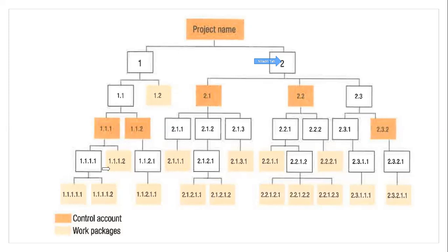So there, the dictionary is very handy. Maybe you are looking into some kind of a dependency on somebody else's vertical, and you find out some word like compliance to meet the FAR regulations, and you're not sure what is that, so you go to WBS dictionary and you find out what exactly a FAR regulation means. Okay, and then you find out, from here it's a written document about anything which is beyond the normal verbiage the PM teams are using. It can have many other stuff as well.